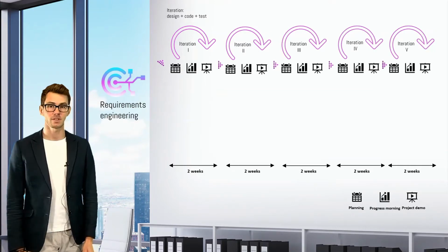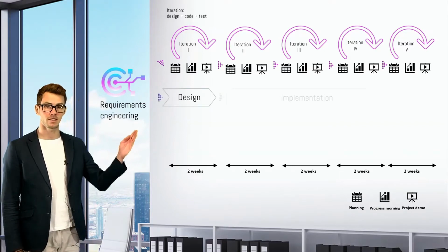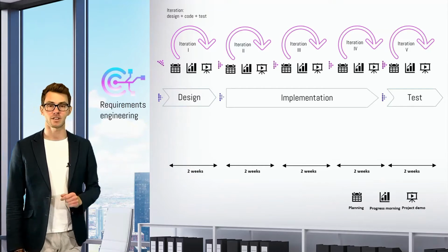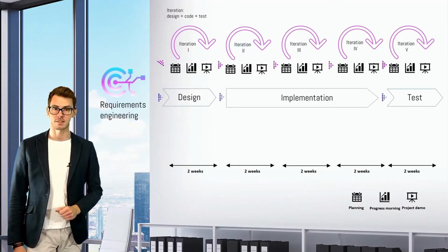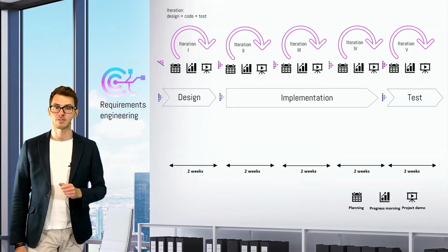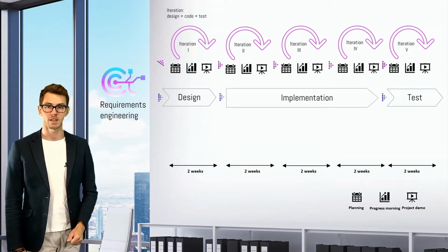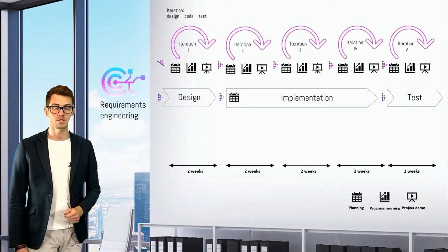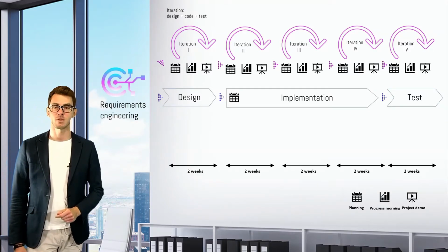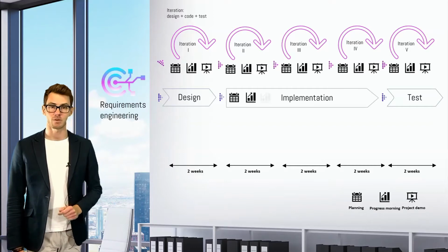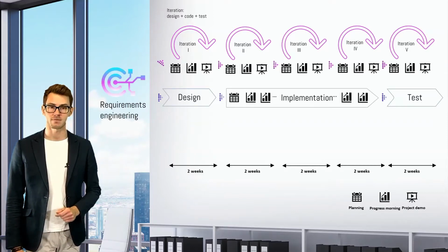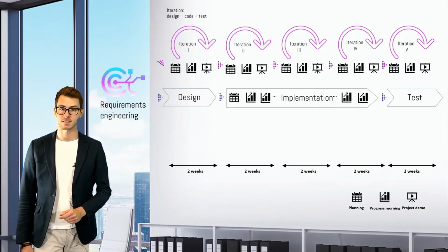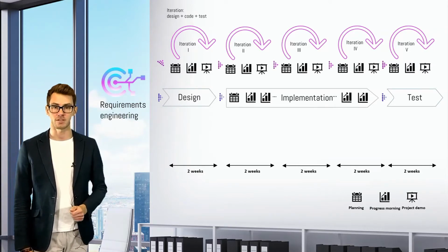Sequential approach imposed succession through design, implementation, and testing phases, each stage requiring specific artifacts to be produced. As part of the design, students were to conceive their solution and formalize it by means of documentation. Implementation kicked off with a planning exercise for the whole phase ahead, and onwards consisted mostly of coding activities with regular progress checkpoints. They were formally monitored with earned value KPIs. A final phase of testing involved executing prepared test cases, bug fixing, and polishing the application.